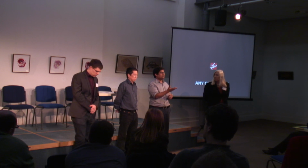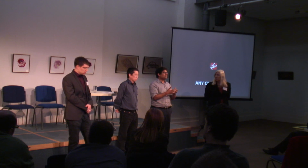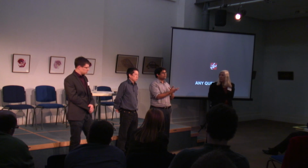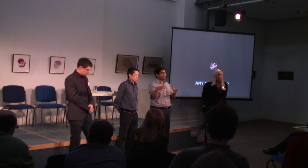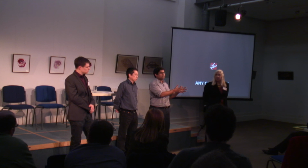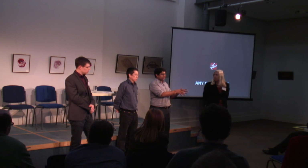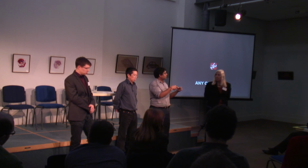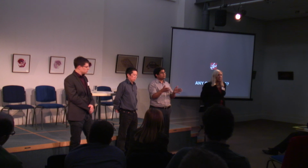And then there's the environmental side, being able to assess the building, running things like the energy analysis early on. You can make the big changes, which will help down the line. People say 80% of the end cost of the building is in the first 20% of design. So if you're just drawing sketches, that's going to be lost, and you're going to have issues down the line. Whereas if you're collaborating and getting all the accurate information early in that 20%, you're able to make much bigger savings down the line.